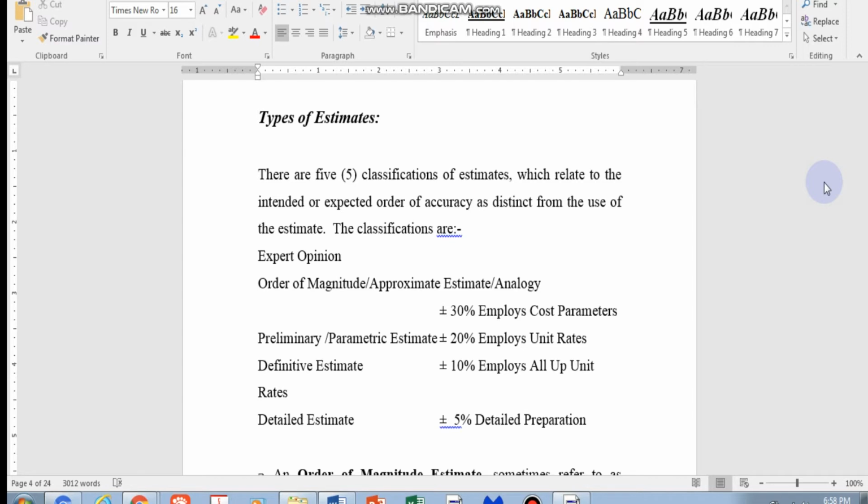Normally these all-up rates are available, and you need to work on an all-up rate as well. You could actually divide them into different categories of things, which is also okay, but no matter how detailed you do it, because you do not know the workflow or the sequence of the activities, it's only an estimation. So you really cannot have a timeline in this particular session. As long as we start to have a timeline to merge with the schedules, then you are looking at detailed estimates already.